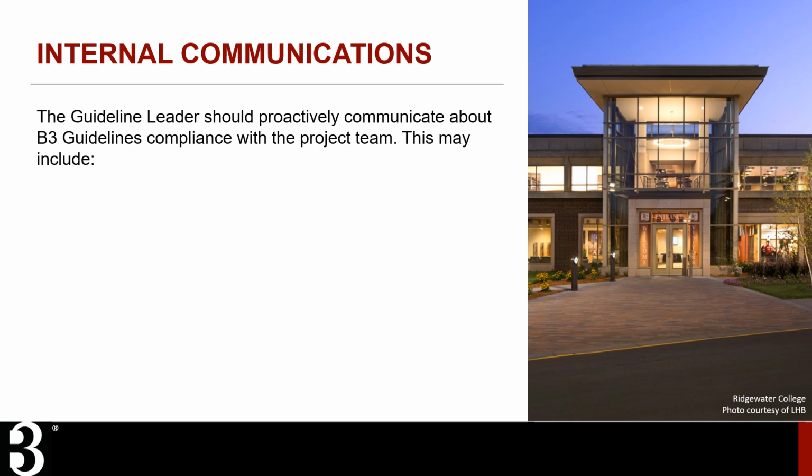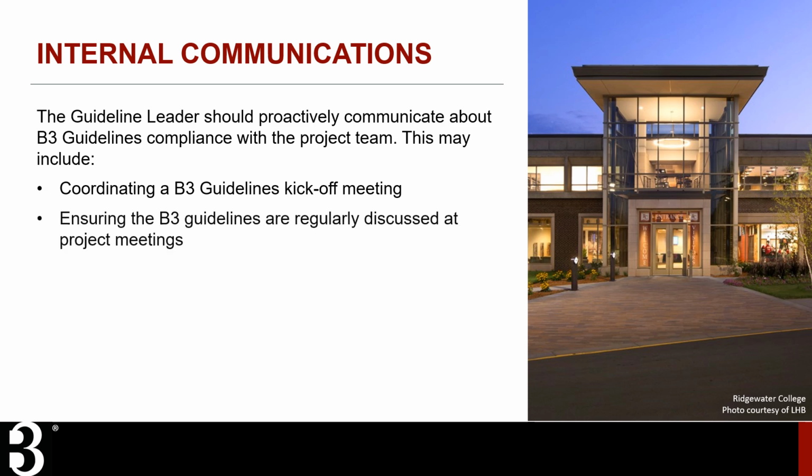The Guideline Leader should proactively communicate with their project team about compliance with the B3 Guidelines. This may include coordinating a B3 Guidelines kickoff meeting to review the requirements, member roles and responsibilities, optional guidelines, and logistics associated with the B3 Guidelines compliance. This may also include ensuring that the B3 Guidelines are being regularly discussed at project meetings and that compliance progress is being tracked regularly. Throughout the project, the Guideline Leader should support an interdisciplinary participatory team approach and work to coordinate across disciplines.